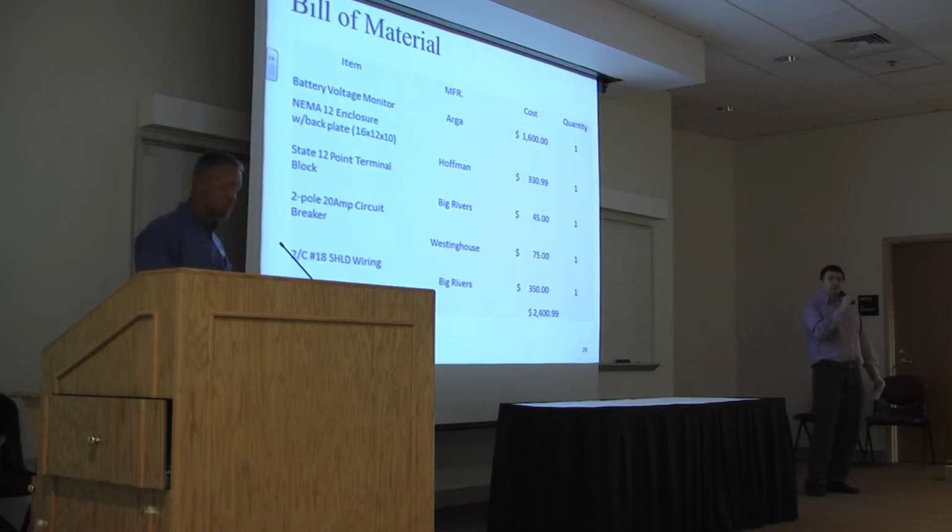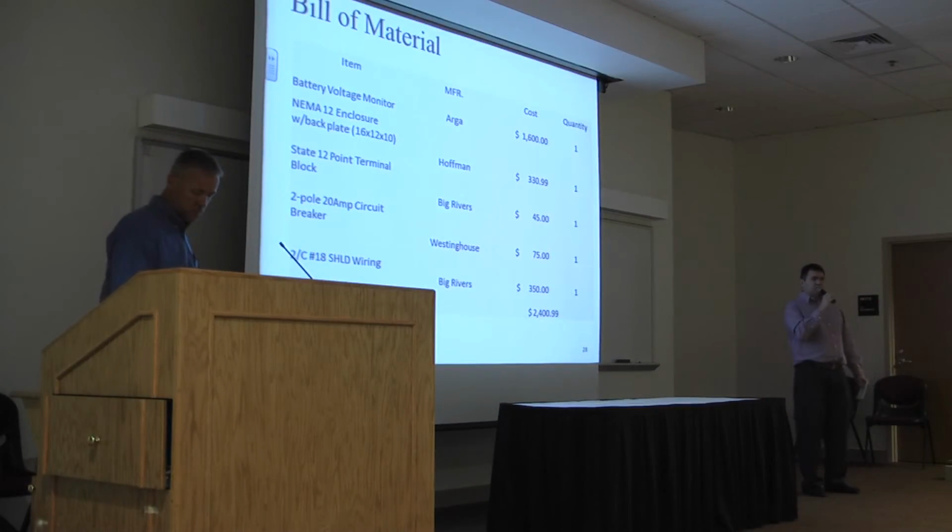For the bill of material, we had the battery voltage monitor, the NEMA 12 enclosure, the 12-state terminal strip, the 2-pole 50-amp circuit breaker, and the communication cables, and the total cost of material for this project turned out to be $2,400.